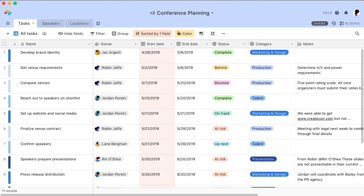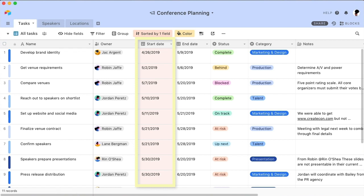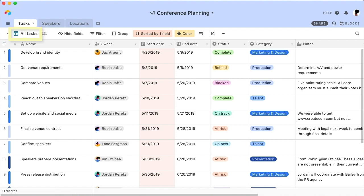Setting up your Gantt block is easy. First, make sure that you already have a table containing the tasks, projects, or other time-bound activities that you want to plot on your Gantt chart. At minimum, this table must include two date fields, one that holds a record's start date and another that holds its end date. You'll also need a view with all of the records you want displayed in the Gantt block.